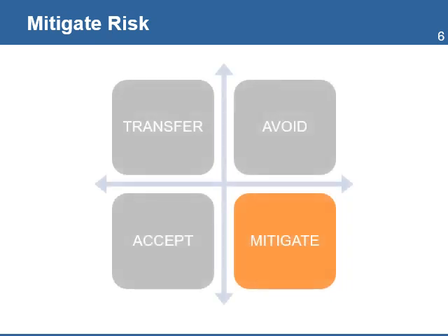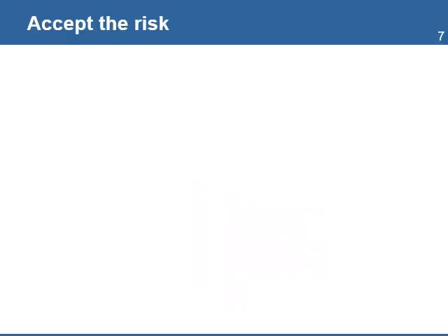Mitigate the risk is the option you have when you cannot transfer or share the risk. Mitigate includes activities designed to reduce the impact to the project if the risk were to occur. For example, an activity that may take too much time to complete and may delay the entire project. To reduce the impact of the risk, you decide to increase resources to help complete the critical activity on time. In some cases, the mitigation actions may not eliminate the risk, but will reduce its level of impact.